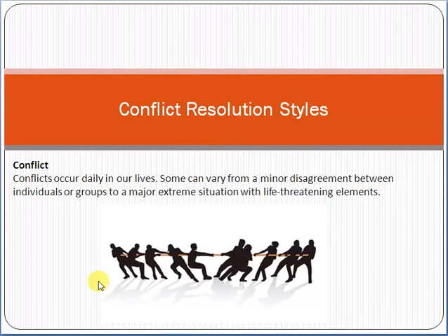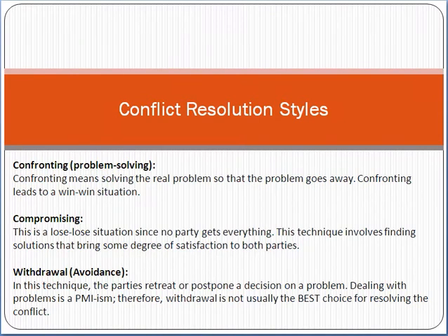Now we are coming towards conflict resolution techniques. Friend, as a project manager you should know what a conflict is and how to deal with conflicts as well. A very common conflict resolution technique is confronting, or the problem solving approach, where confronting means solving the real problem so that the problem goes away. Confronting leads to a win-win solution.